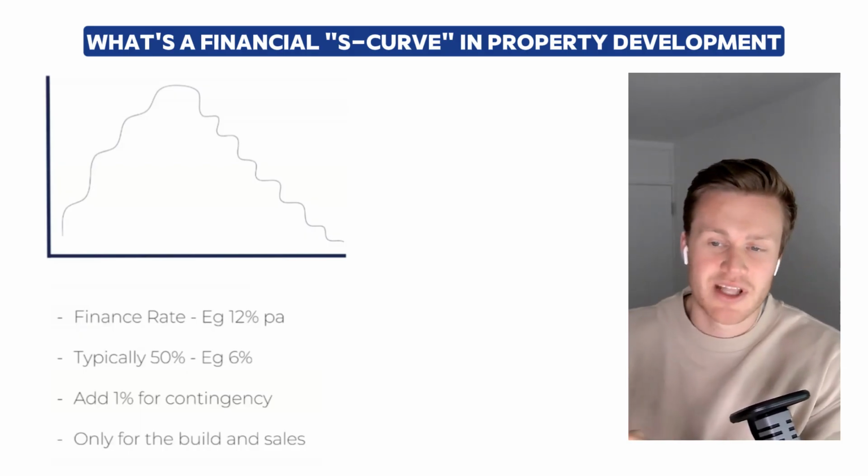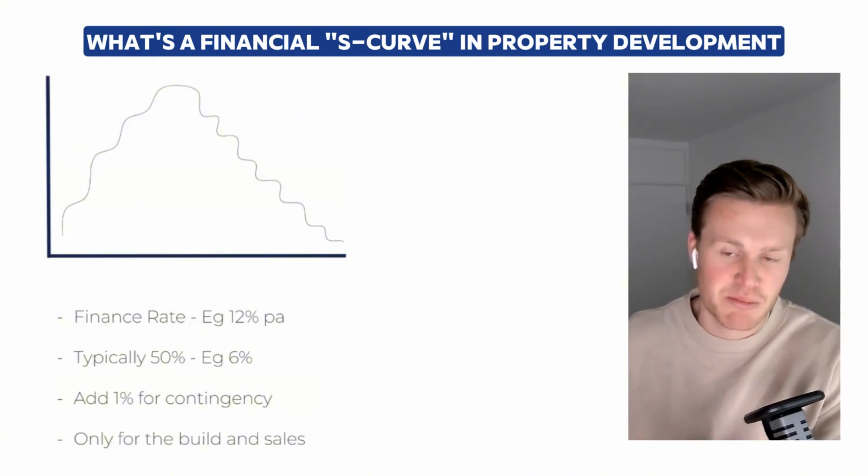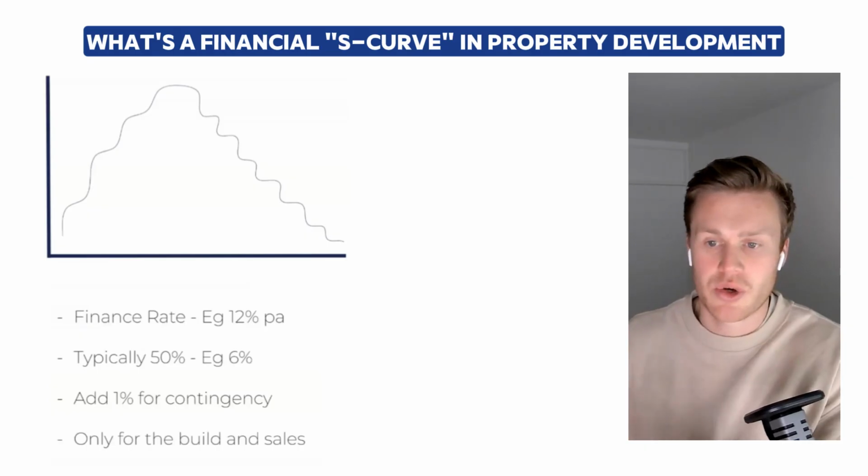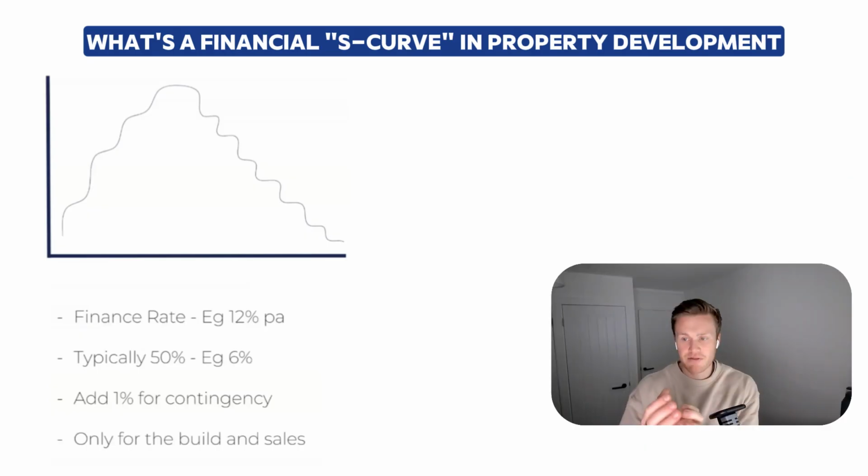And we then got on to the lovely topic of an S-curve of the development facility, which is probably the most important part for Tom because it's basically the cost of finance while you're delivering the project. The bank fund the first part, which is the full duration of the project, which is the purchase finance. That goes in the day that you buy it and comes out the day that you pay that last flat down or whatever it may be, or refinance. Whereas the development facility is quite a convoluted process to estimate what that's going to cost. And that part is called the S-curve.